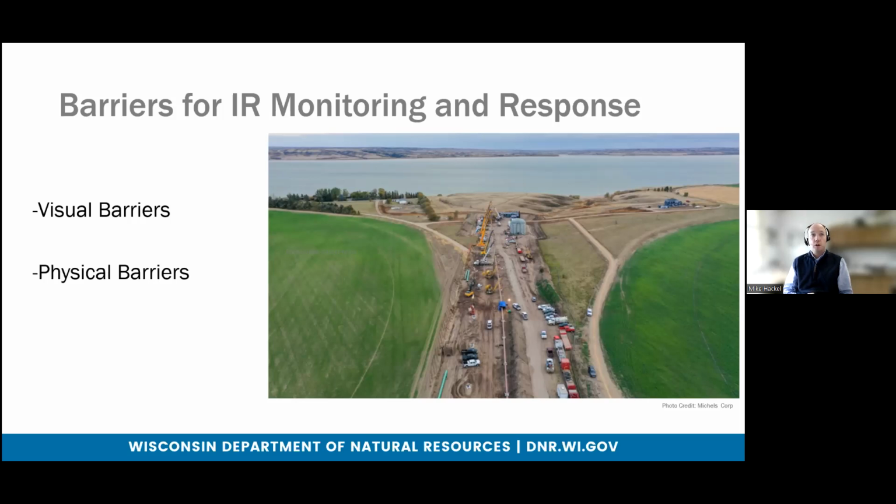Is the crossing through a wooded area? Wooded areas do not provide resistance for monitoring because we can walk through it and monitor the drill path as we're going along, but it is problematic for response because it limits the ability to get equipment and materials to the IR area for cleanup of that IR.